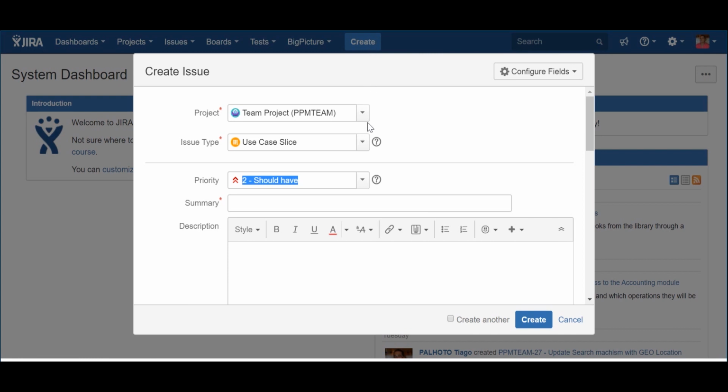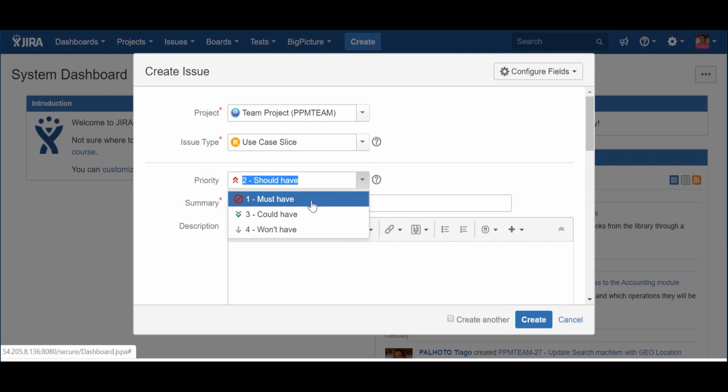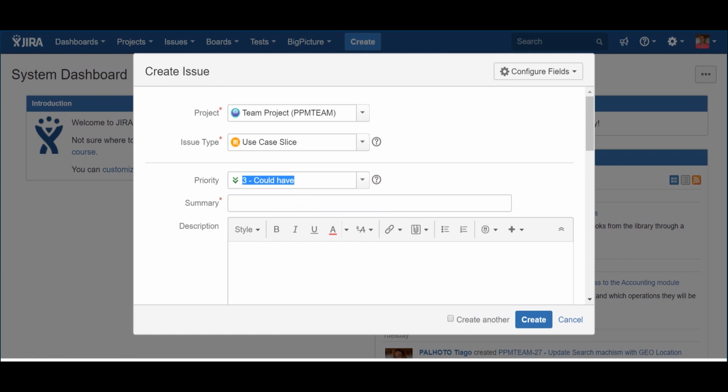Now let's take a look at the most relevant fields. The first field is the priority. The priority works just like I described it for the user stories, which includes the use of the MoSCoW model. The visual ordering offered by Jira can also be used through the attribute rank. However, such option is not very clear, especially for those who are analyzing a list for the first time, since there is no visual indication of that ordering. Still, it's a matter of choice and you should choose the one that suits you the best.